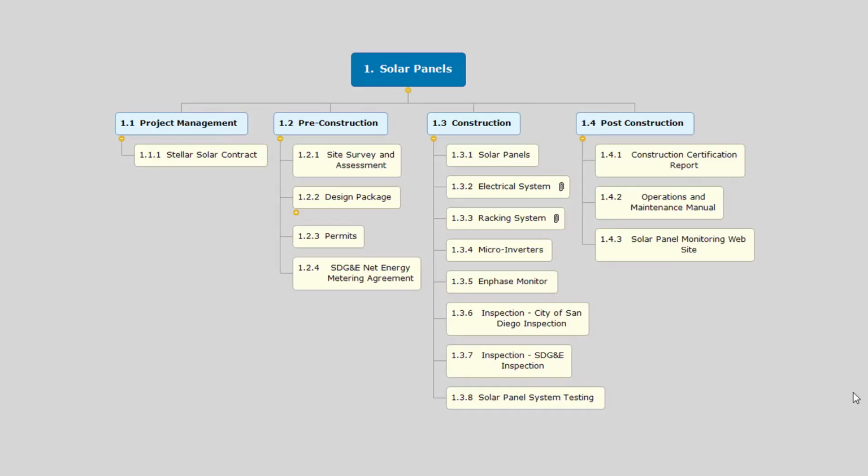Remember that you would still have to research the references. They may be codes, specifications, etc., and make certain that you identify if they're deliverables, and then you would enter those in the appropriate level 2, either pre-construction, construction, or post-construction. I recommend that you review the SOW a number of times. After you've completed the mind map, review one more time and verify that you've identified all of the deliverables, identifying the multi-scope type sentences, and also, again, focusing on the references.